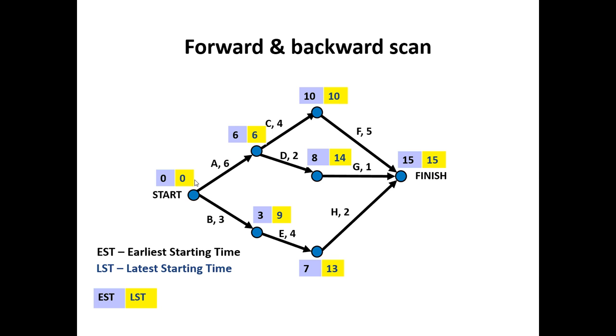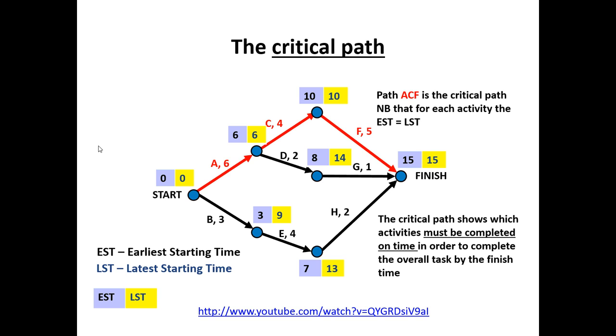Let's now have a look at our critical path. Now a critical path is the path we must take, whereby to extend or delay any activity on that path, will extend or delay the entire project. So let's consider. If we start at zero, activity A takes six minutes. Activity C takes four, which gives us the time of ten. Activity F takes five, which takes us the time of fifteen.